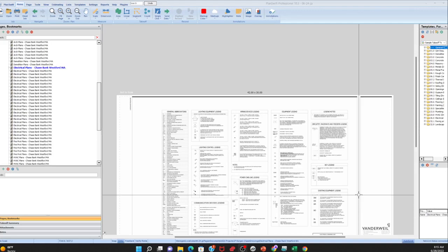Electrical is a different beast because when we talk about the wiring, we have wire assemblies. So we have a wire assembly for the feeder. Could be what? Number 300 plus a number 8, all in a 2.5-inch conduit. Well, if you're doing the takeoff for that, you have to do the actual takeoff from the scaled plans. And so it's a lot. But then again, that's why electricians make a lot of money, because this is a lot.